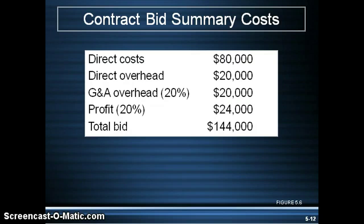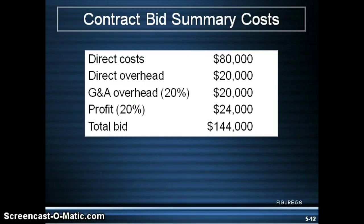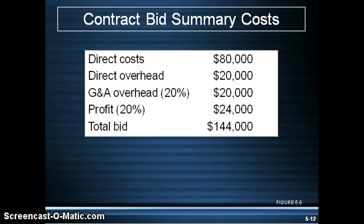Here's a great example of breaking down these costs. You've got your direct costs at $80,000 and direct overhead costs at $20,000. Then your general and administrative overhead costs are 20% of the direct costs and direct overhead costs combined. Direct costs and overhead costs total $100,000, so 20% of that would be $20,000. The profit is also shown, which is generally how contractors write it — they include the contingency, the G&A overhead, and then the profit so that everything is transparent to the customer. In this case the profit is 20% of $120,000, which is $24,000, making the total bid $144,000.